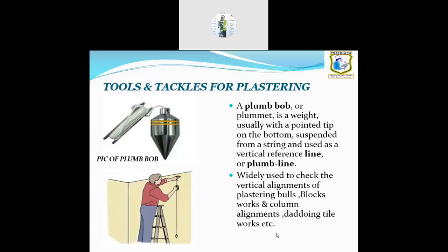Without doing marking, you cannot do wall dadding, because you will not know where the cut tile is coming and where the full tile is coming, because of the plumbing joints. So you have to take care of this and start from a particular area. That's why this drawing is very much essential to carry on the wall tiling operations. We'll ask the architect to produce the drawing, and only then we carry on. There he would have specified where the cut tile is coming and where the full tile is coming. Okay, so this is the process we follow.